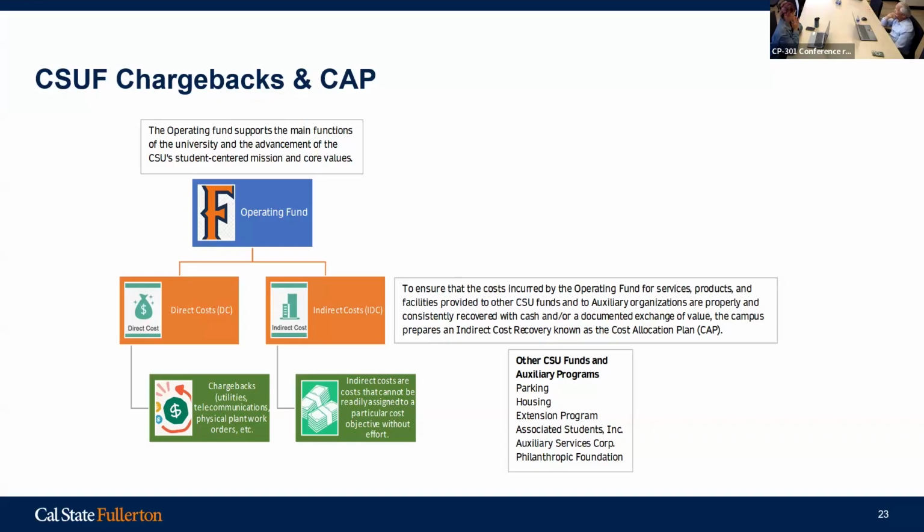Normally we do not add the overhead, the university cap. We just concentrate on the capital project itself. And we have to show that that capital project alone can survive operating by itself. And then we look at it integrated with the existing building.